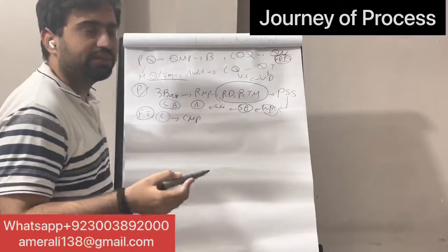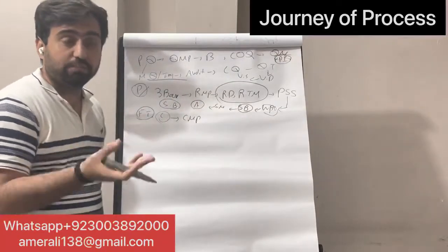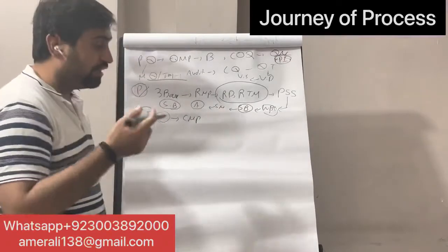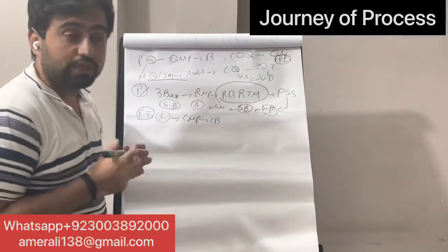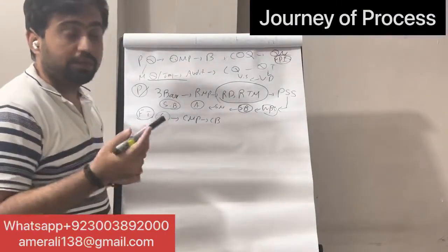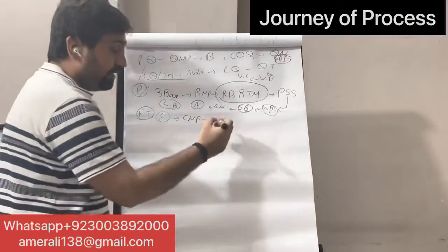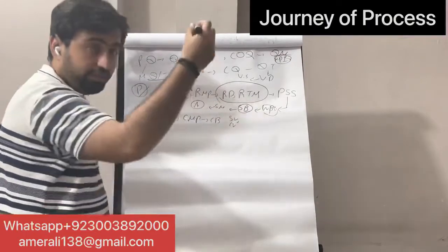What is funding limit reconciliation? You use analogous estimation, parametric, 3-point estimation, and bottom-up estimation, and cost aggregation to make the cost baseline. And the cost baseline includes contingency reserves, whereas the project budget includes the cost baseline plus management reserves. Then you check the schedule variance and cost variance through earned value calculation.